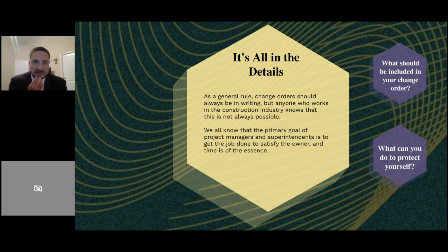So a lot of questions I have is, of course, does the change order need to be in writing? We've kind of discussed it doesn't have to be in writing, but it should be. If you can't get that signed and agreed to beforehand, you need to follow it up.